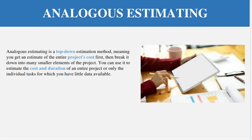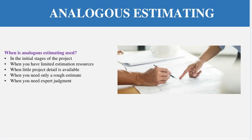We normally use analogous estimation when we are in the initial stages of a project. Initial stages means you are in the initiation phase — discussing with the customer that you need an e-commerce solution, and you recommend that six to seven months and a certain cost is required. Secondly, we use it when we have limited estimation resources and don't need drill-down level estimation — just a rough order estimate. At this early stage, project details are very limited; scoping and deliverables are available only at a high level.